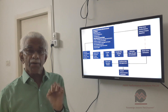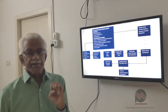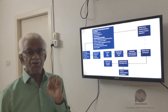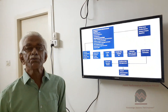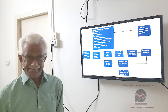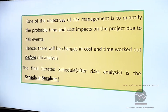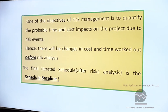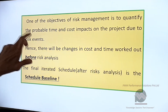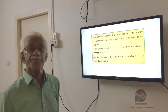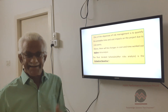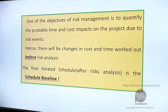This is one important aspect of creating a schedule, because your schedule is not complete until you do the risk management effort. One of the objectives of risk management is to quantify the probable time and cost impacts on the project due to risk events. Hence, there will be changes in cost and time worked out before risk analysis. The final iterated schedule after risk analysis is the schedule baseline, or the schedule performance baseline.